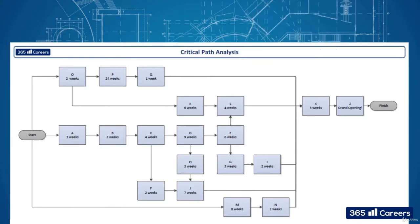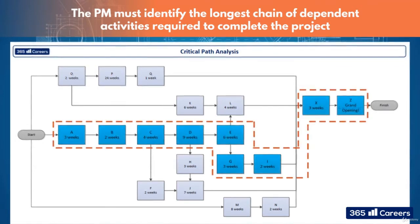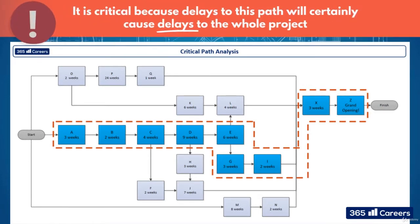What you must do as a project manager is identify the longest chain of dependent activities required to complete the project. This is called the Critical Path. It is critical because delays to this path will certainly cause delays to the whole project.